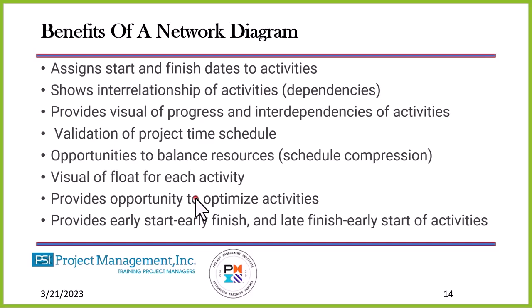When I look at fast tracking, it increases risk. Let's say that I'm working on a database, and there are certain programs that connect the different databases. I'm still building the database, and I start working on the program that will tie all these databases together. As I am creating the databases, I may make changes to something that would require you then to go back and redo the programming. When I work things in parallel like that, then I am increasing the risk.